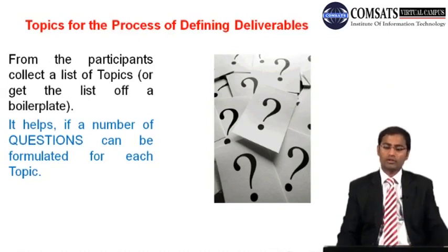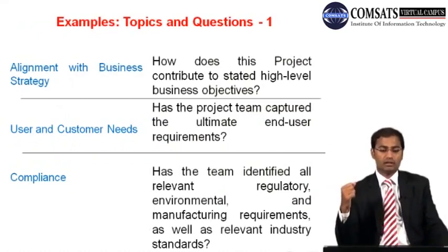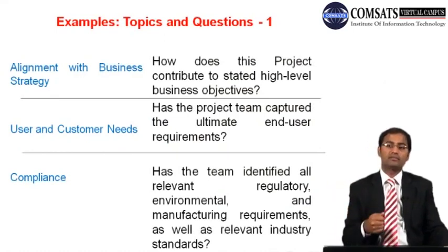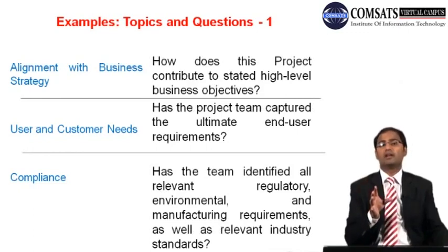Topics for the process of defining deliverables. From the participants, collect a list of topics or get a list of boilerplate. It helps if a number of questions can be formulated for each topic. Example topics and question one: how does this project contribute to the stated high-level business objectives? Is this project in alignment with the business strategy of the organization? This is a very, very critical question.